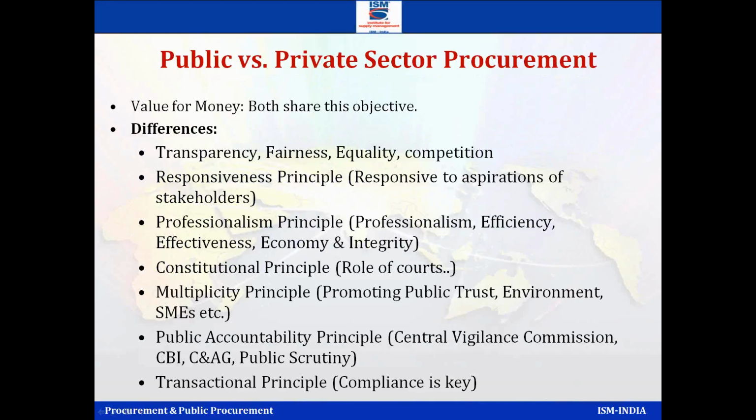First thing when they come and visit your company in the public sector, oh, are you complying with the guidelines? Are you complying with GFR? GFR says competition. Did you give 1 month notice? Did you get 3 quotations? You have to answer all those. While in the case of the private sector, these issues are not there. For them, time is money. If they are not able to sign the contract within a week, they're wasting the time.